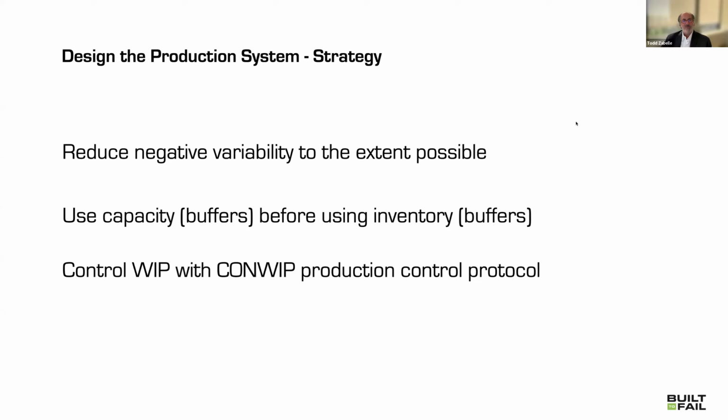So really the strategy was to reduce variability. When you start talking about moving stuff in over the roads, 9/11, the complexity of the site and all, you're dealing with a lot of variability. And I'm sure everyone on this call knows there's variability. You're either going to lose time or you're going to have costs go up, right? So one of the things that we came up with, and this is very, very, very contrary to construction, is to use capacity buffers rather than inventory.